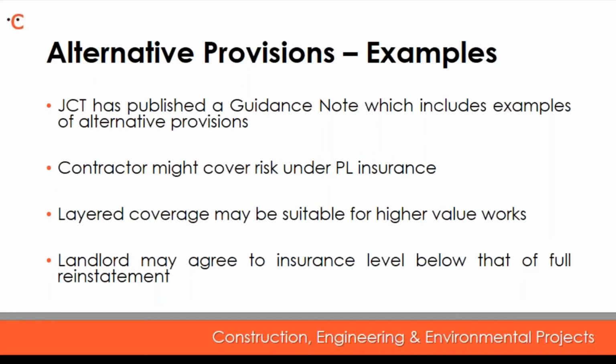Moving up once again, the landlord might in fact agree where the value is again significantly higher to an insurance level below that of full reinstatement. If you're going to do that, the contractor should really just ensure that they have a suitable cap on their liability. Always important to remember.